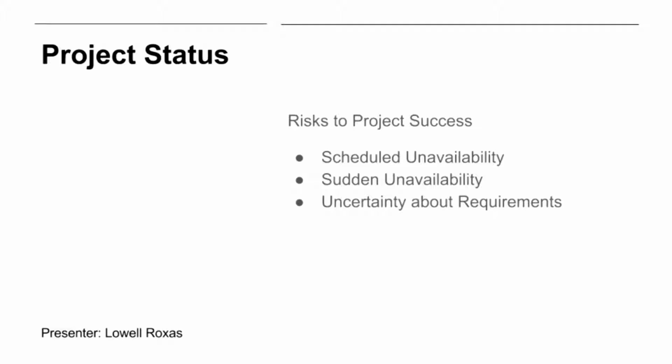In the event that someone suddenly becomes unavailable or doesn't get their share of work done, we preemptively set deadlines that are a little earlier than necessary. If someone can't or doesn't meet them, we have enough time to divide their work among the rest of us. This way, we stay on schedule.